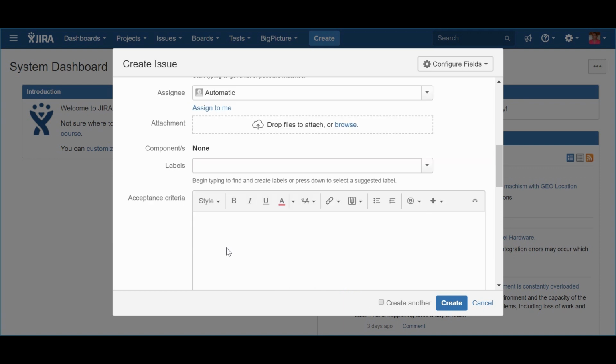Acceptance criteria. Just like it happens with the stories, enabler stories, etc., the epics also have acceptance criteria defined by the business and agreed with the team. The acceptance criteria is a key element to help the owners and the teams to validate if the epic is delivering what was expected. Please note that the acceptance criteria of an epic is not the roll-up of the acceptance criteria of the stories that are part of it.